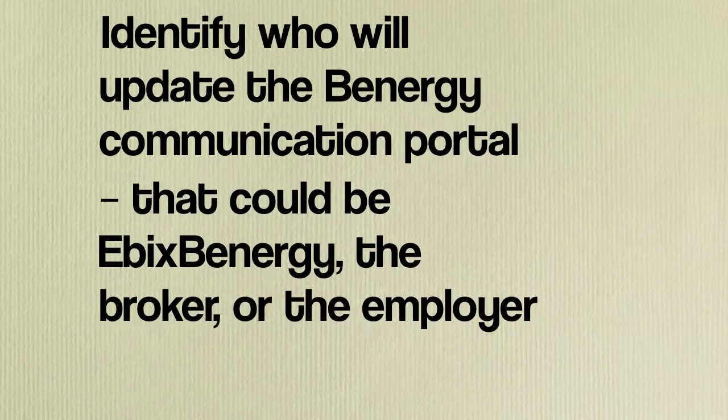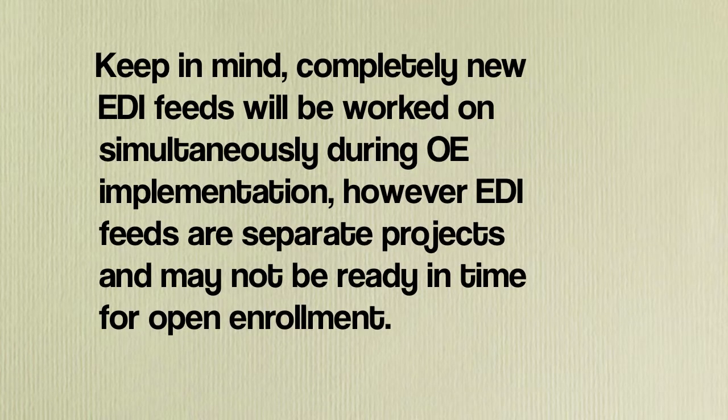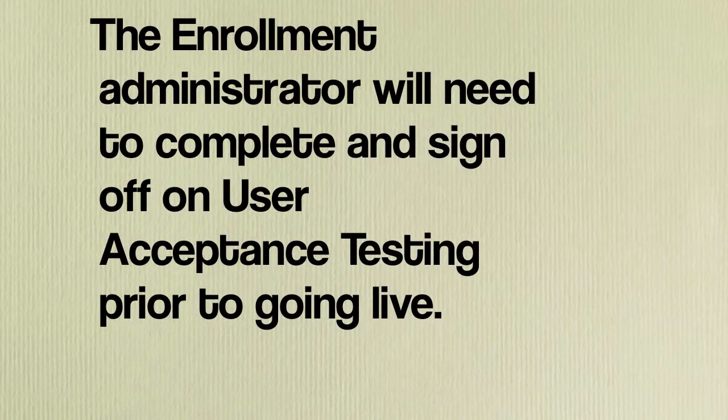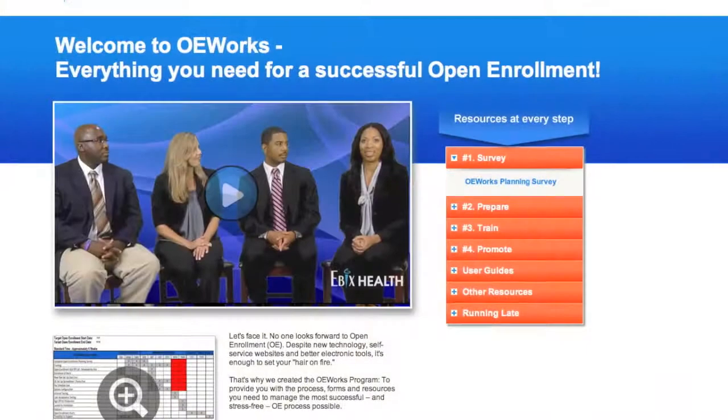Identify who will update the Benergy communication portal. That could be eBix Benergy, the broker, or the employer. Keep in mind, completely new EDI feeds will be worked on simultaneously during OE implementation. However, EDI feeds are separate projects and may not be ready in time for open enrollment. The enrollment administrator will need to complete and sign off on user acceptance testing prior to going live.